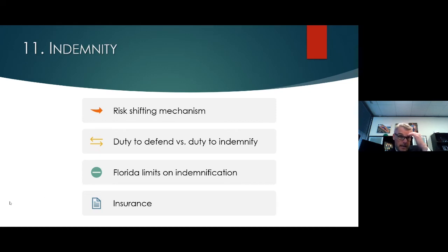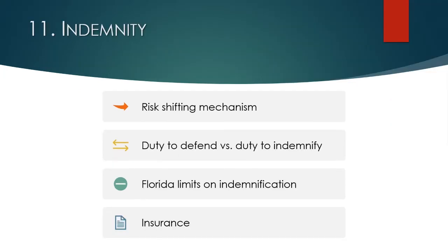I would suggest that in context of any indemnity provision that you're looking at, whether you are looking at a subcontractor, prime contractor relationship, or in the prime contract itself with the owner, pay close attention to what the parties are required to indemnify for. If you're just going to indemnify the other party for your bad acts, no problem. When you start requiring somebody to indemnify you in whole or in part for your bad acts, there are a lot of bells and whistles and hoops that you have to jump through to make sure that that's enforceable.